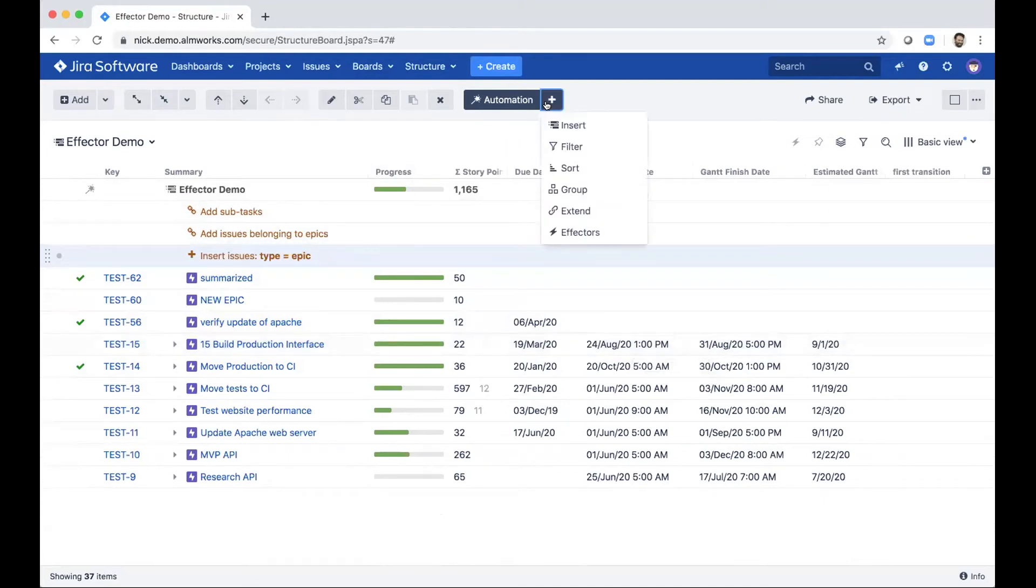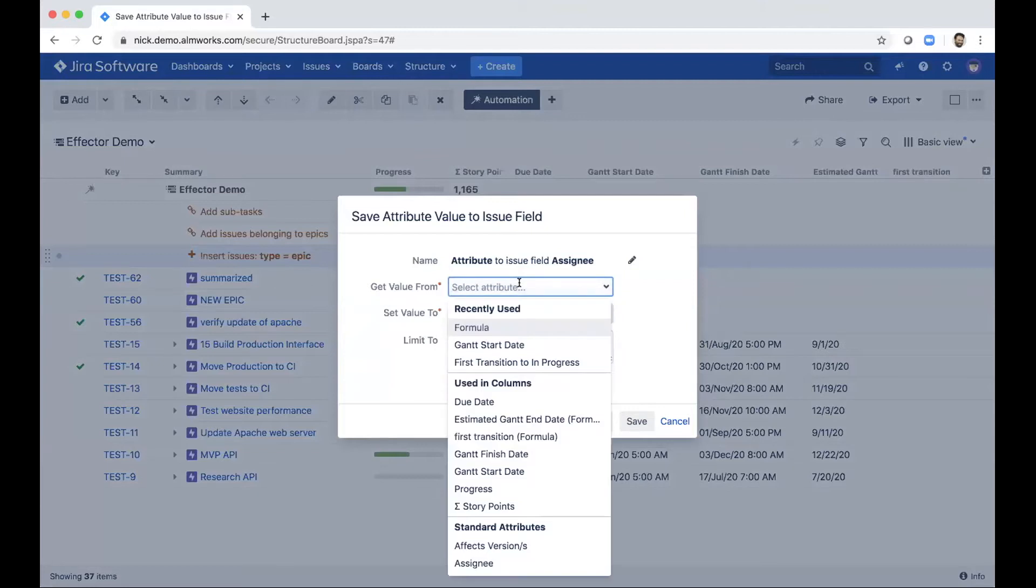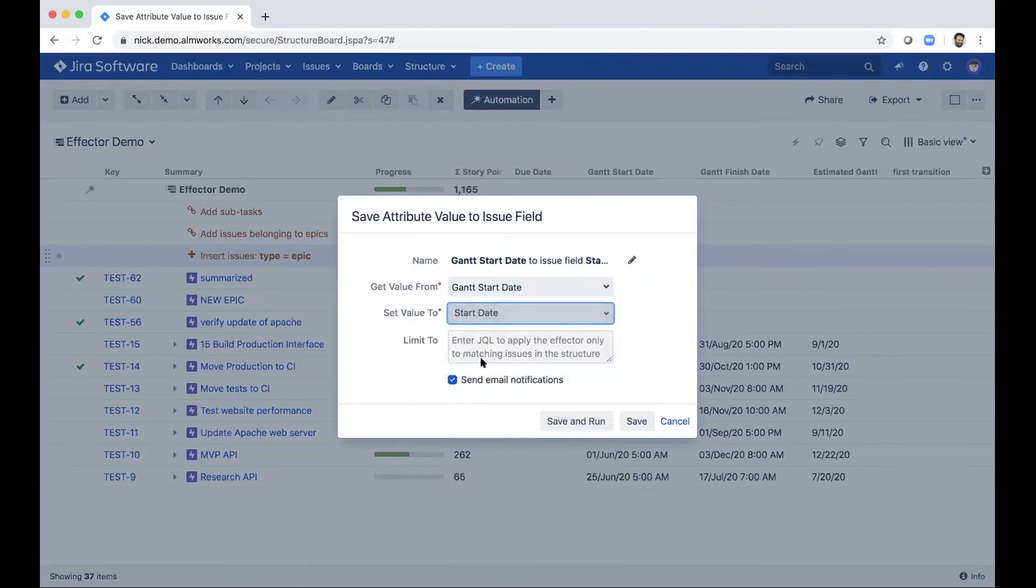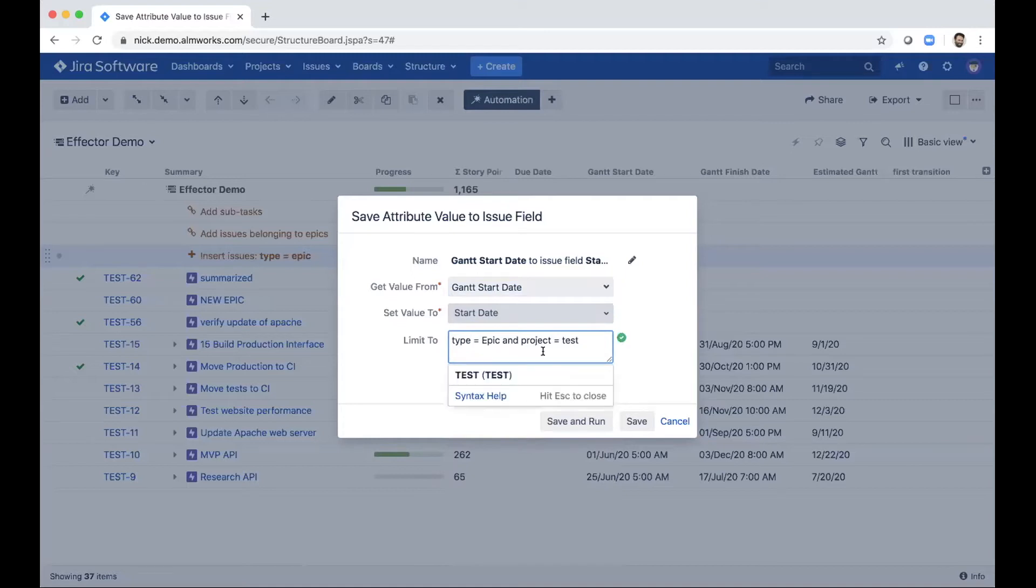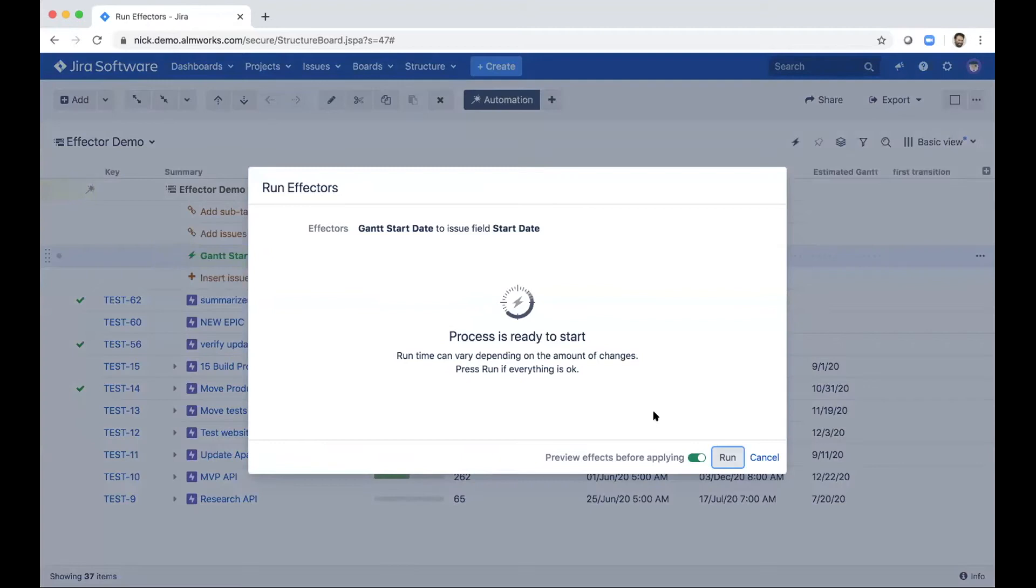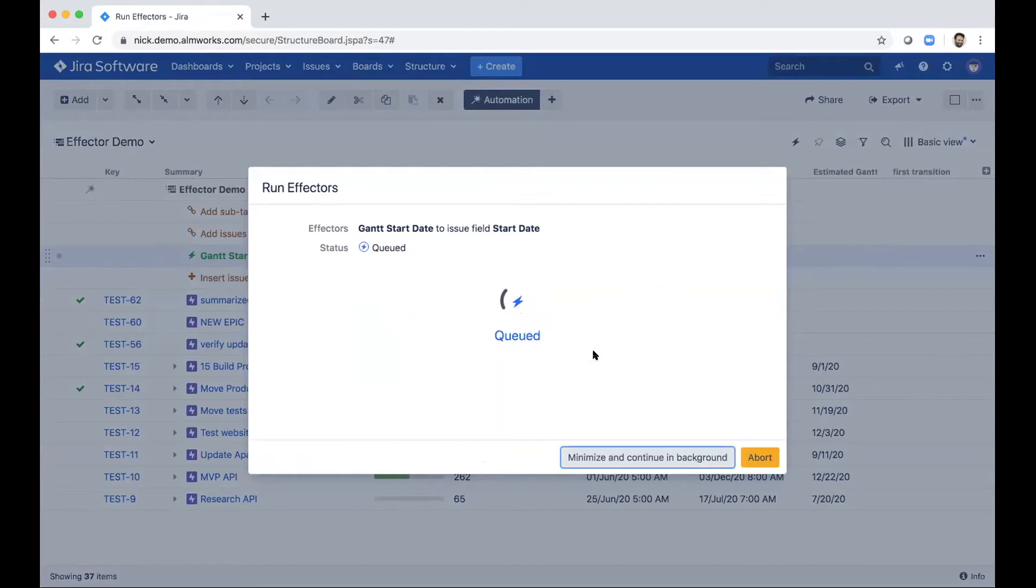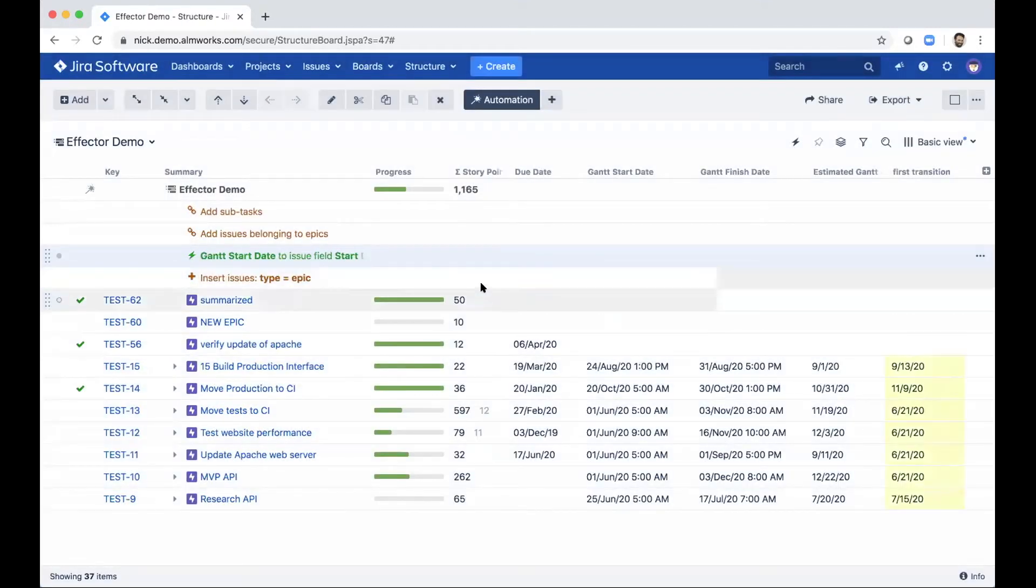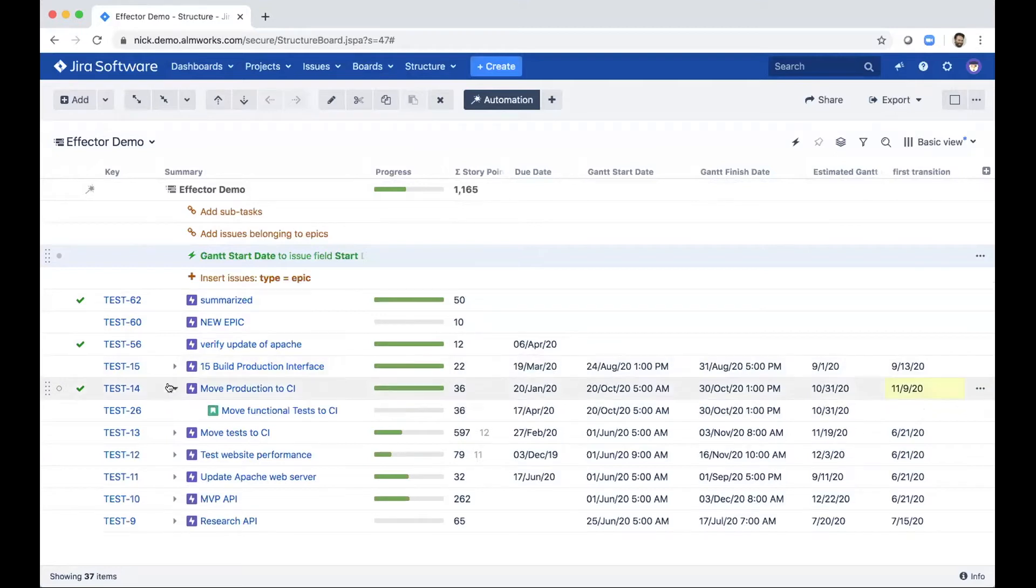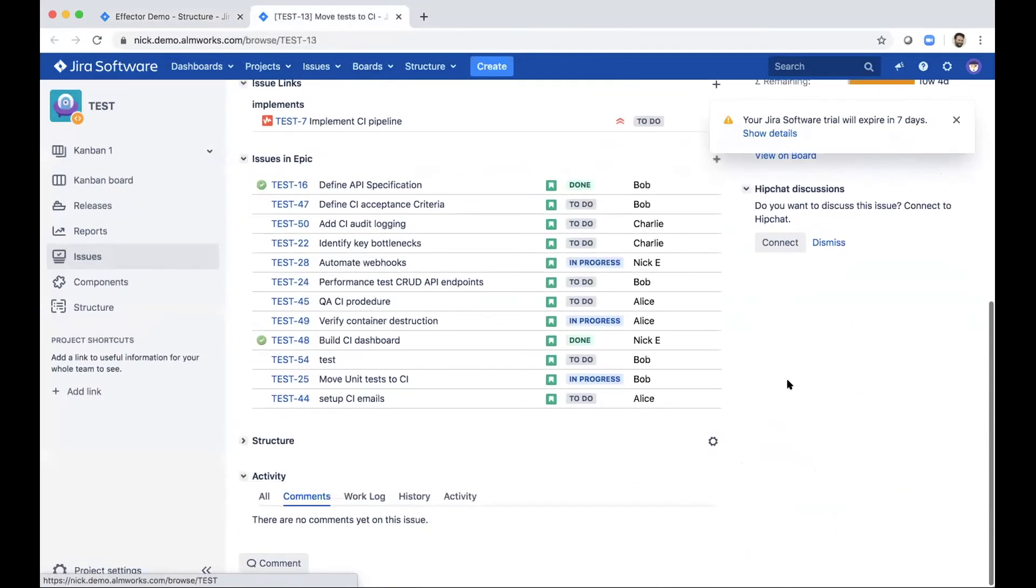So I can just open up my automation, add an effector, and we use this attribute to issue field effector. And I can copy the Gantt start date over to my actual start date field. And then I'll use some JQL to make sure that I'm not doing this for every single issue, but just for the epics in this project. So now I've limited it pretty significantly. Now it's yelling at me that I'm putting this in the wrong place. And we'll get to see a preview before we actually run this. So now I'm changing the start date of all these different issues. And let's just apply all here. Shouldn't take too long because we're only dealing with seven issues.